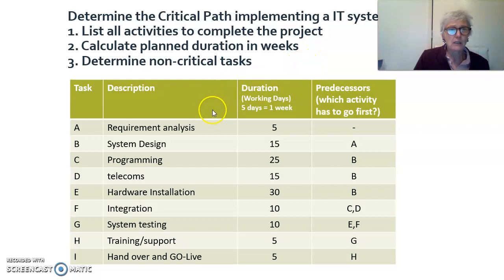Now, in this case, we've got several tasks from A to I, which starts with a requirement analysis, system design, programming, telecom, hardware, installation, integration, system testing, training, handover, and go live. So then the project is finished. Now, the third column shows the duration in working days, and 1 week is 5 days.